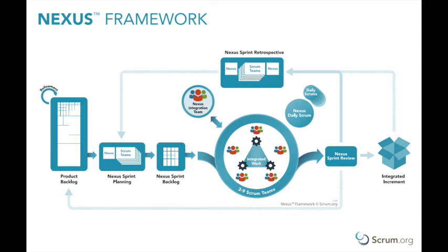The second part consists of each Scrum team holding their own sprint retrospective as described in the Scrum Framework. They can use issues raised from the first part of the Nexus retrospective as input to their team decisions. The individual Scrum teams should form actions to address these issues during the individual Scrum team sprint retrospectives. The final third part is an opportunity for appropriate representatives from the Scrum teams to meet again and agree on how to visualize and track the identified actions. This allows the Nexus as a whole to adapt.